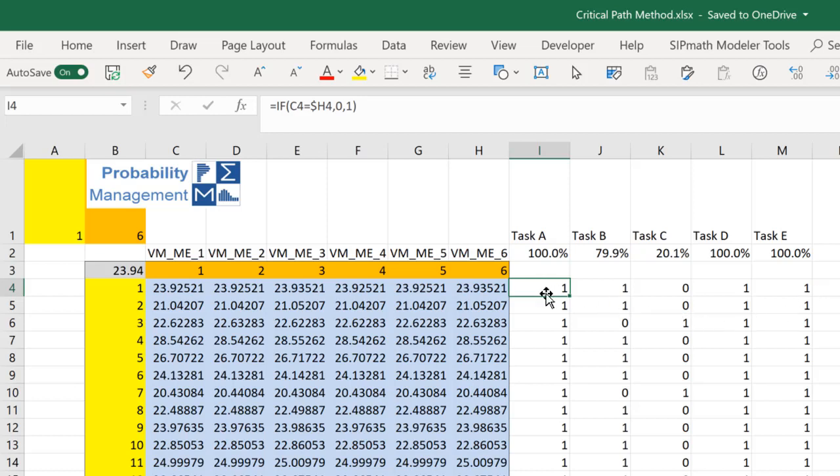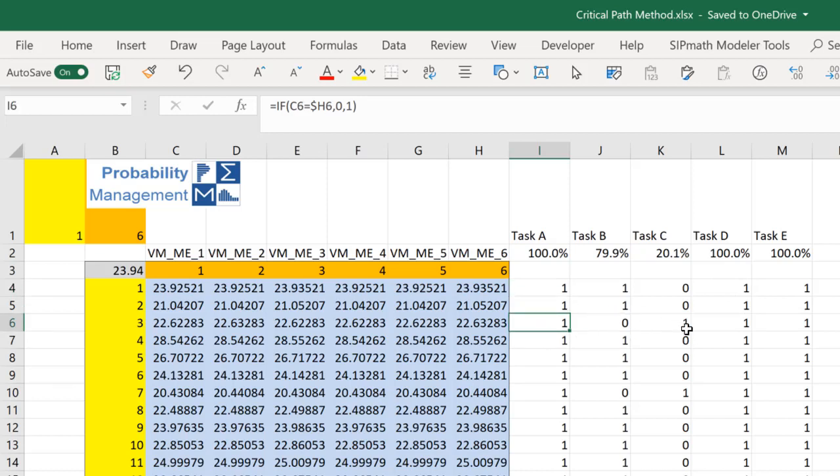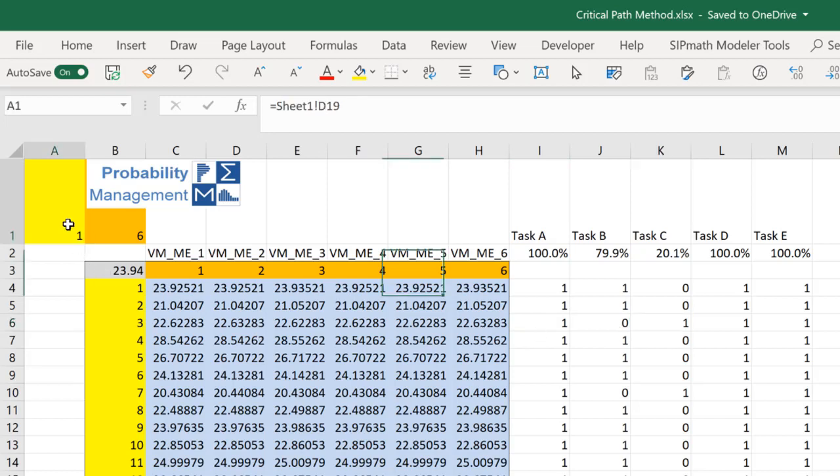So here, the first two, you can see the critical path is A, B, D, and E. But when I get to simulation 3, now C is on the critical path. Let's set this to 3 and go look at it.